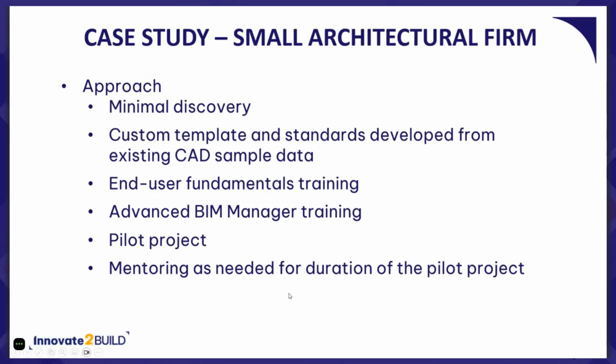So the approach we took, we did minimal discovery. We pretty much just looked at their deliverables and identified those things that needed to be in the template to make their new deliverables as consistent as possible with the old. Sometimes that's not a requirement, but most firms like some consistency. And then we developed a custom template and standards from the data that we analyzed during the discovery.